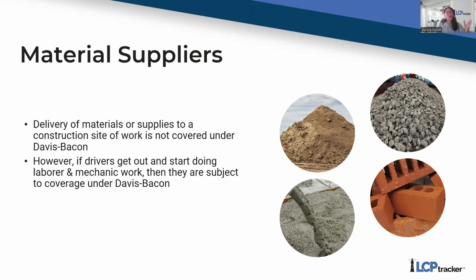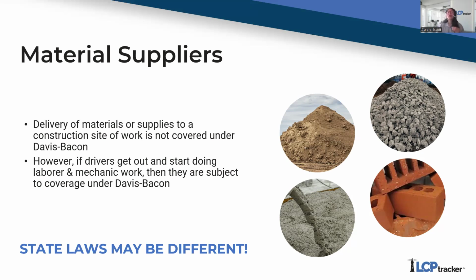Now material suppliers, typically the delivery of materials or supplies to a job site is not covered under Davis-Bacon, that delivery time. However, if that driver gets out and starts doing labor or mechanical work, and I'm talking, oh, they want to be super helpful, they want to jump onto a forklift, and they want to start unloading materials and supplies, guess what? Heavy equipment operators operate those forklifts. Now that material supplier, that driver, would be considered a heavy equipment operator, and they would be covered under Davis-Bacon rules. So keep in mind as well that state laws may be different in regards to material suppliers. So again, it's really important to understand where your funds are coming from for your particular project.